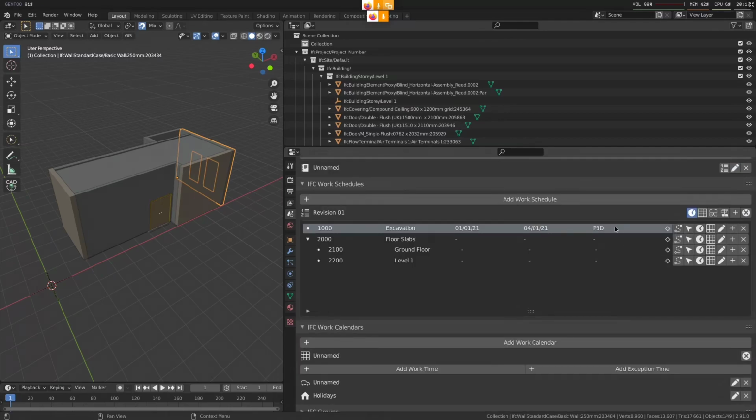So you can see when I save that, it's recalculating. So we're still in the process of making it basically synchronize your changes. So change 3 days, for example, it'll update this from the 1st to the 4th, and it'll check all of your lag times and relations with other tasks.